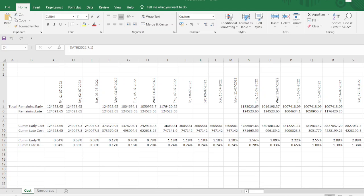To avoid this in the future, better to make the progress curve directly from the daily values. And then in this case, our actual plan values shown in Primavera will match with the progress curve.